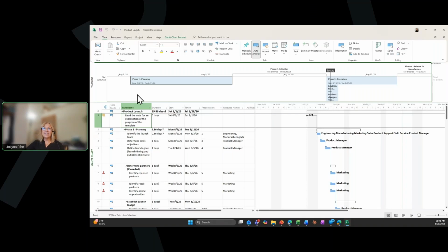So you can see that I've got a timeline view at the top, but then I'm in what is called a Gantt chart view. The Gantt chart view is showing bars similar to the premium plan you saw just a moment ago, basically showing how long a task duration is. So you can see under this column, so it's got this table view on the left-hand side showing us an indicator column. It's got a task mode column, the task name, how long is the task going to take, when is it going to start, when is it going to finish, etc.